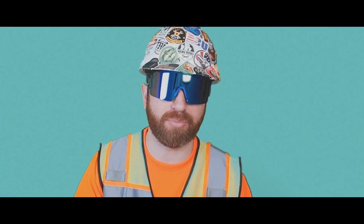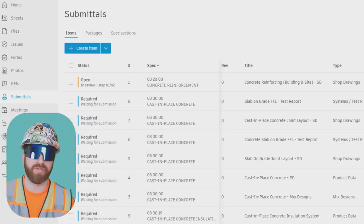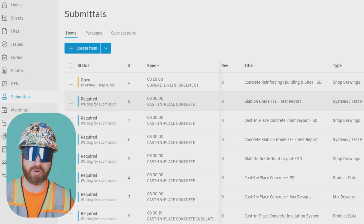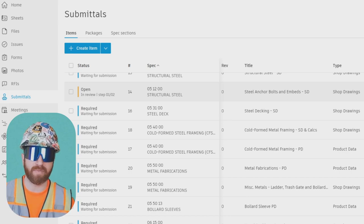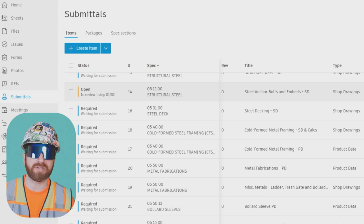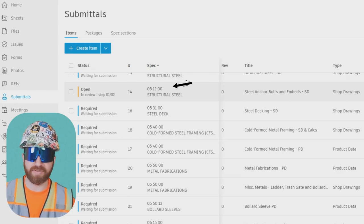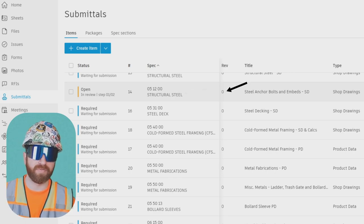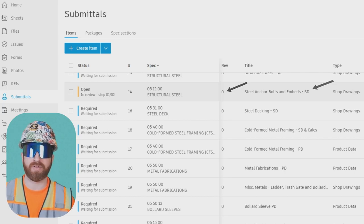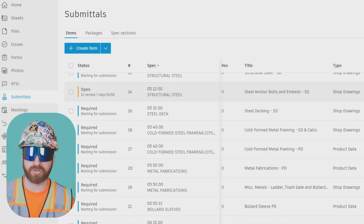The submittal specification section may require the construction manager or general contractor to provide a submittal log at the beginning of the project within a certain timeframe. The submittal log is a summary of all the submittals the contractor is going to provide, including the subcontractors. It is usually the task of a project engineer to pull this information from the spec sections — manually or using technology — and provide this list to the architect and engineer. Each submittal on the log will have its own submittal number, drawn from the specification section it came from, plus a revision number and a title.